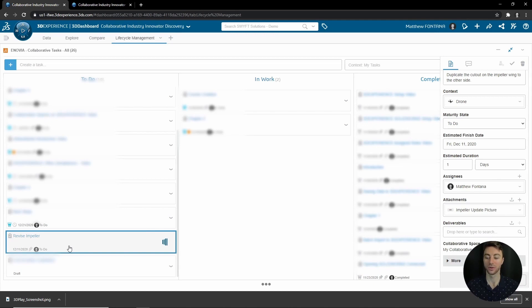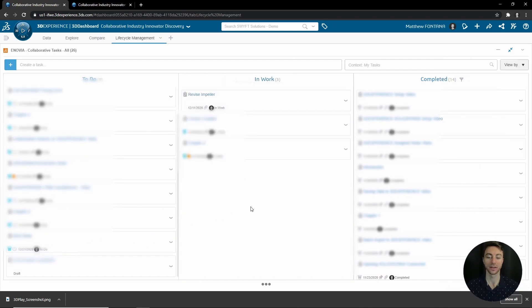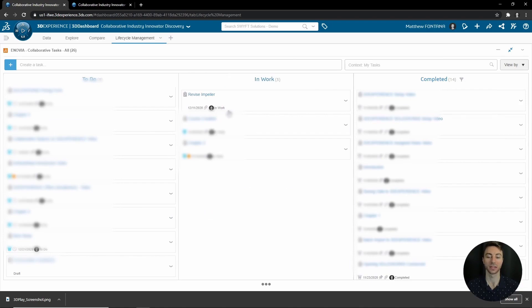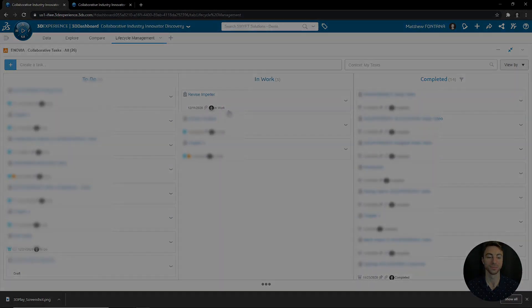Once it has been set to To Do, it will load and you will now see To Do here. Once you're ready to start working on it, you can click and drag it instead of opening up to In Work, and now its status will automatically be updated to In Work.